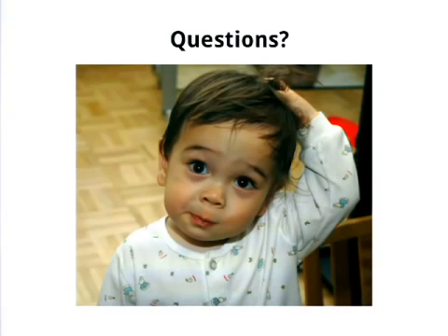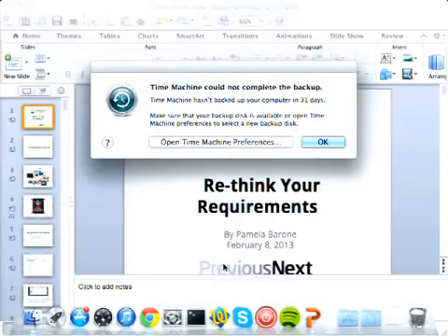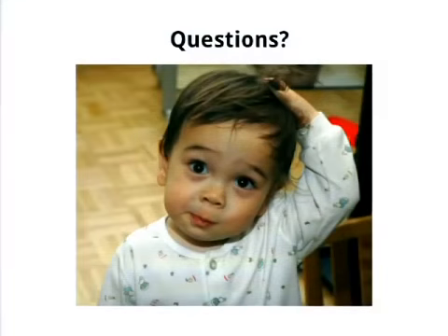But really, once you have the budget, like I said, it's 20%. That pie chart was 20% inception, 10% delivery, and 70% construction. But if you found that the inception phase only took 15% of the budget, that's 5% more you can use for construction. And they really like to hear that. They like to hear, "Oh, cool, more money."